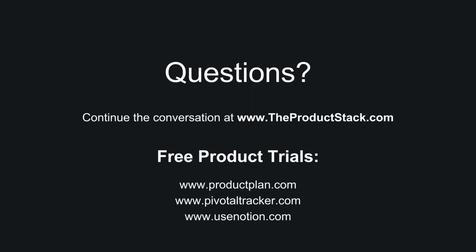Then as far as estimation, I think there are multiple levels of estimation. There's typically a high level guess as to how big a feature is. T-shirt sizes are commonly used for this. We tend to look at things in terms of pair weeks, because at Pivotal, everybody pair programs, so we always count developers in pairs. So we say this is roughly a 12 pair week initiative. It's just a guess, you know, the reality will probably be longer or larger. It always is, but at least it gives you some relative sense to compare. And that's all you can do at the level of roadmap planning.